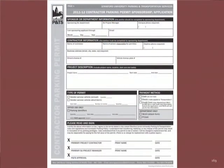This is a slide showing the contractor parking permit sponsorship application form. The primary information required here is the sponsoring department information: sponsoring department, project manager, contact information, and the duration for which they're sponsoring the project. General contractor or subcontractor information and their contact information is very important. And a brief project description: the name of the project, the duration, start and end time, and maybe some details as to whether it's a phased project where initially you'll have 1 or 2 vehicles, and it'll ramp up to maybe 10, 20, 50, whatever the size of the project is, so that we can plot out what your parking needs will be.